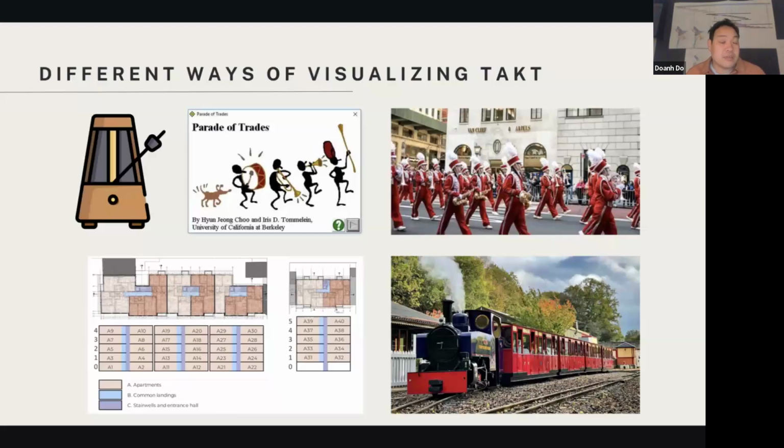But labor utilization is different from how an owner makes money. An owner makes money when the project is delivered faster. So an owner would be willing to have you be less productive in terms of utilization and have their buildings done faster. So there's a misalignment in incentives between the trades and the field crews. If you're HVAC, you want to keep people busy all the time because that's how you make money. But as an owner, you want to finish the project faster. So there's a misalignment in incentives here.